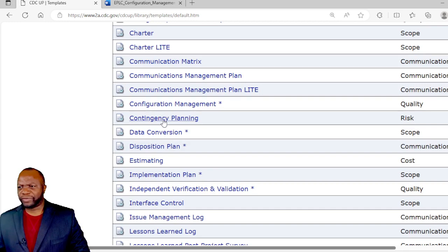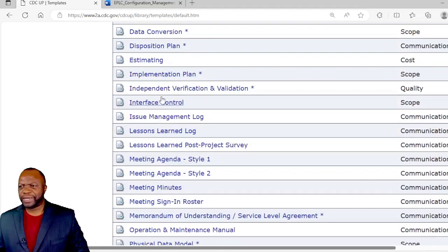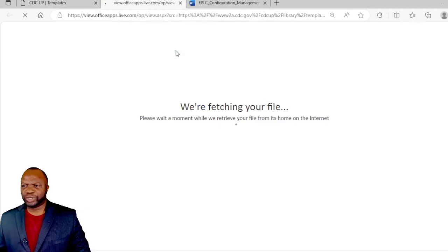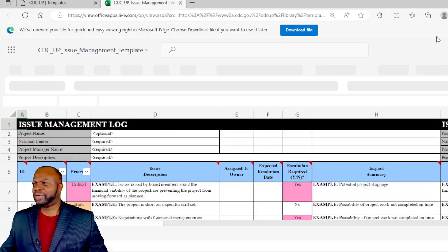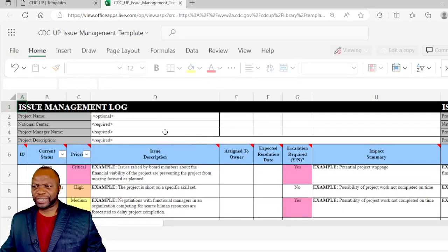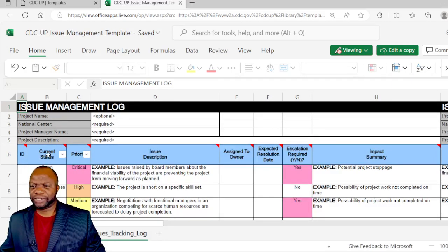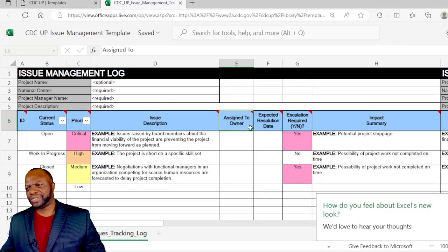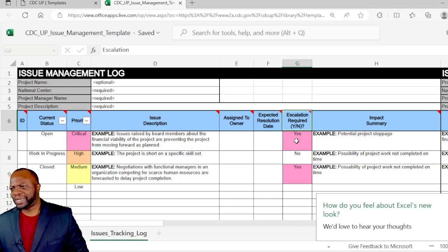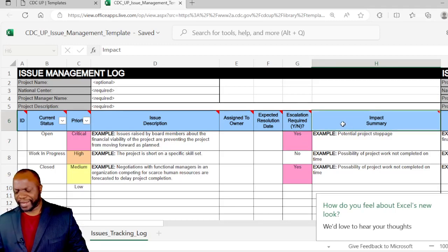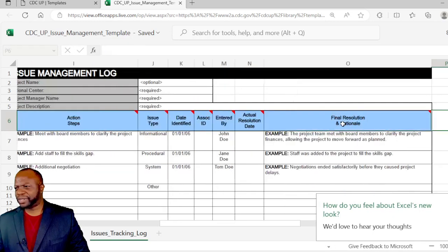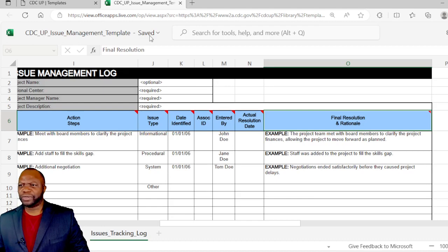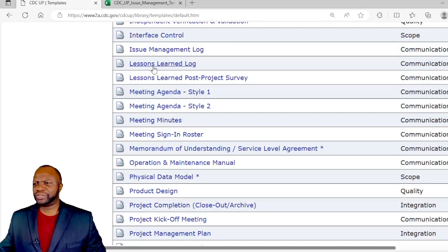Moving on, we have contingency planning, data conversion, disposition, estimating, an implementation plan, independent verification and validation, interface control, issue management log. An issue log is where you document issues and an issue is a problem. It's something happening now and these need to be discussed, better understood, and then we need to assign these issues to an individual so that we can get resolved. Sometimes escalation is required. You've got the impact summary, the actions that will be taken and then you're tracking those actions all the way to a final resolution. This is a really powerful document that can help project managers.